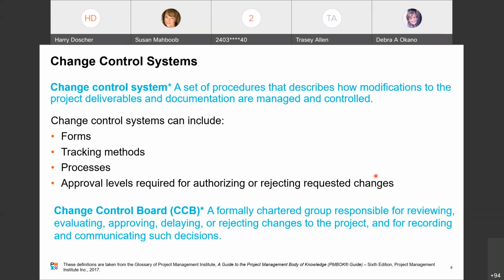So that if there are minor changes, or changes that result in, say, a certain number of days worth of work, and it can be accommodated within the schedules, may need authorization at a much lower level than something that's going to affect delivery to the end customer.